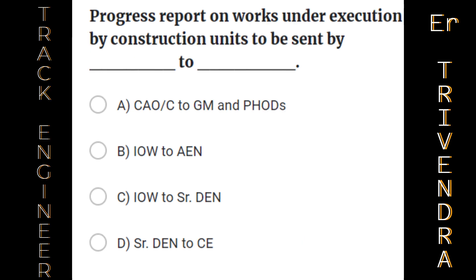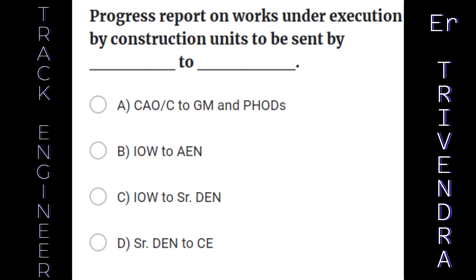Progress report on works under execution by construction units to be sent by: A. Chief Administrative Officer Construction to General Manager and PHODs. B. IOW to AEN. C. IOW to Senior Divisional Engineer. D. Senior Divisional Engineer to CE. The right answer is: Chief Administrative Officer Construction to General Manager and PHODs.